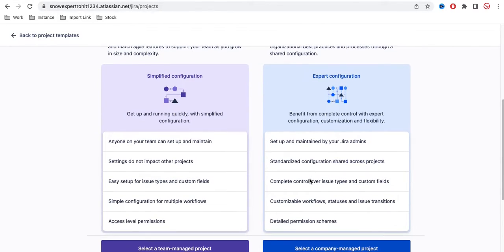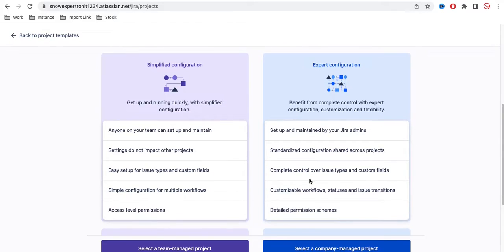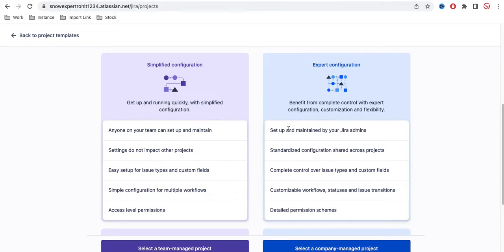Now let's understand their differences in setup. For a team managed project, anyone on your team can set up and maintain it. But for a company managed project, you need a dedicated Jira admin, because in the company managed project there will be a lot of configuration that can override other projects — simple changes can affect the whole board. So if you want a simple setup, go for the team managed project.